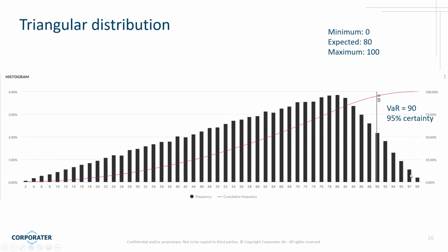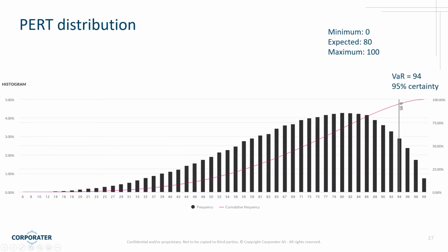So that's a triangular distribution. And then there's also a similar concept called a PERT, and it uses the same kind of inputs. We still have this minimum, maximum, and expected value, but it's a bit softer. You can sort of see that instead of it being entirely linear up and linear down, it's kind of gentle going up, and even a little gentler going down.